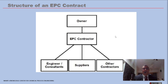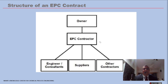The EPC contract is a lump-sum contract in which the contractor takes on significant risk in their bid. Once awarded, the project must be completed within the fixed price — any cost overrun is the contractor's loss, and any savings are the contractor's gain. Under EPC, the contractor directly awards contracts to all suppliers, site erection contractors, civil contractors, and mechanical and piping contractors. The owner is not involved in these activities once the vendor list has been finalized.